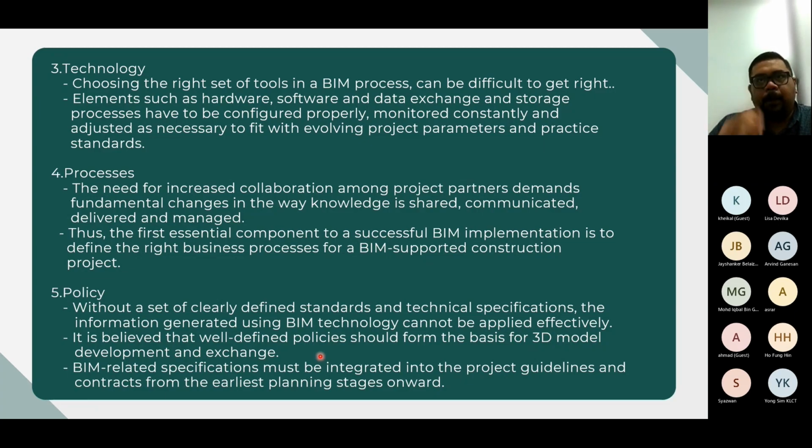If not, for example in the construction part, the contractor will take the shortcut. They will produce everything, the shop drawings and construction drawings, using 2D CAD. Then once the project is almost done, they will hire a third-party BIM consultant to update the model as built. I think that defeats the purpose.